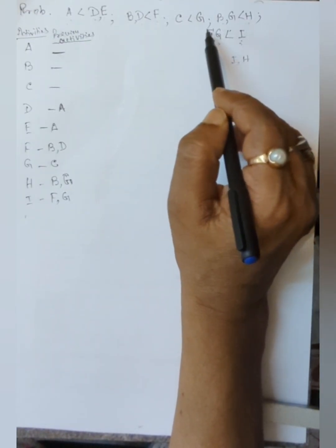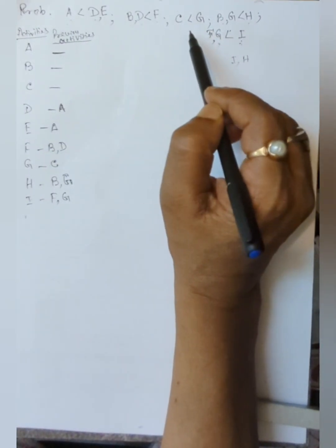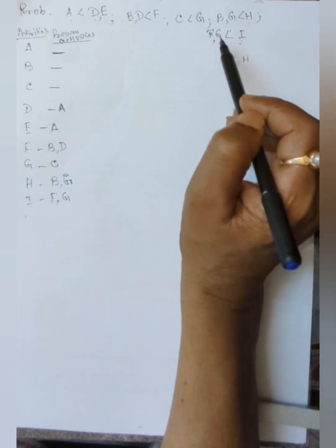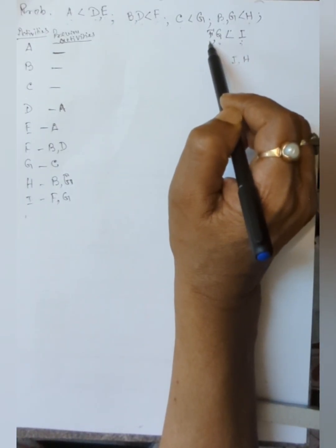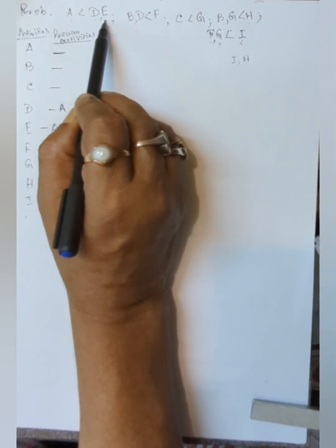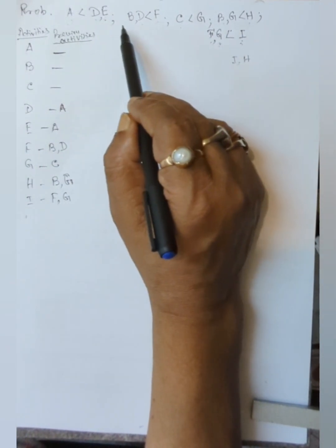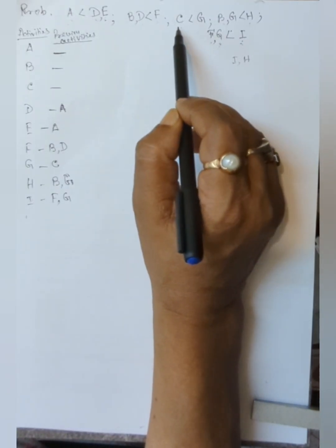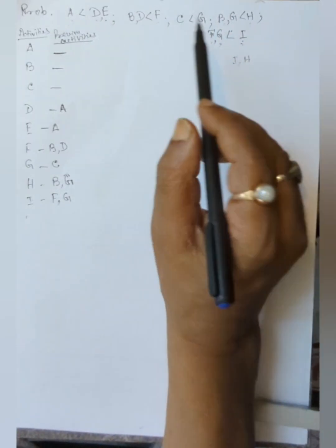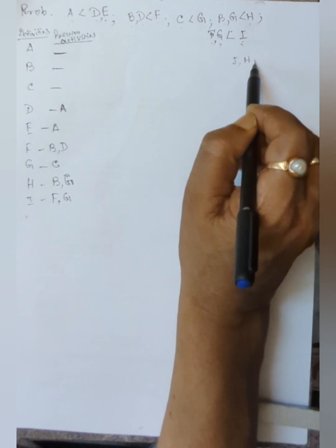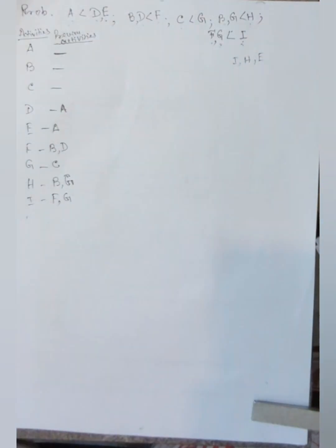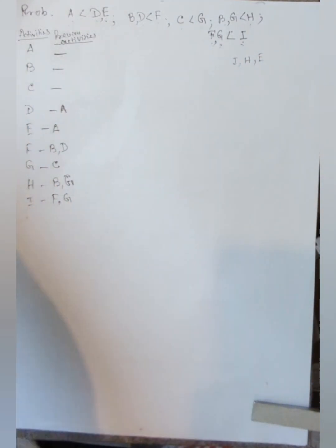C is a starting activity; it will not come. F is used here, it is to be completed before starting, so it is not a terminal activity. E is a terminal activity, because nowhere is there a relationship that E has to be completed before any other activity. You can say E is also a terminal activity. So I have taken some idea of how we will proceed to start.